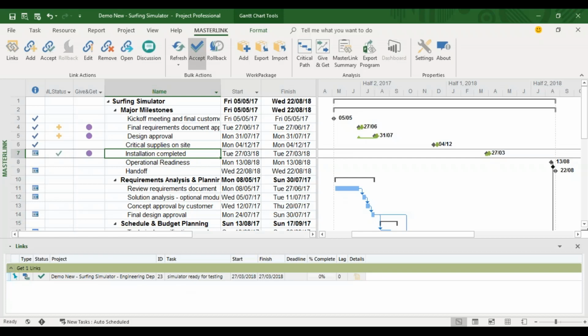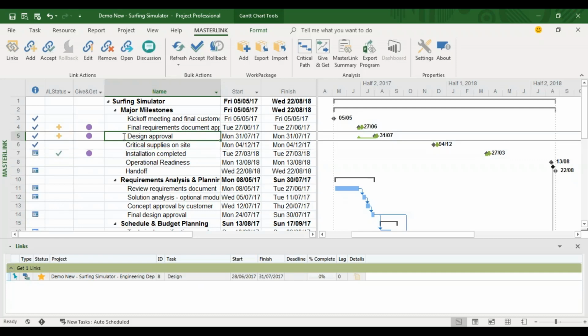In this case, we are aligned, there is no gap, my plan is not impacted, and once I've accepted, I've got that V indicator telling me we are aligned. So right now, my work plan and the other work plan, which is my predecessor, show the same information, and I can go and accept each one individually, or just mark everyone and accept them in one bulk acceptance. And I will, of course, not go on to create that.